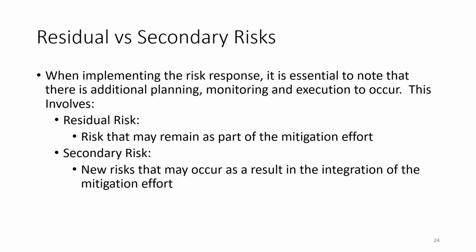Then there's secondary risk, a new risk that may occur as a result of the integration of the mitigation effort. For example, let's say you had to modify your architectural design to ensure you meet your timeline. However, there is a greater potential security vulnerability that may emerge.